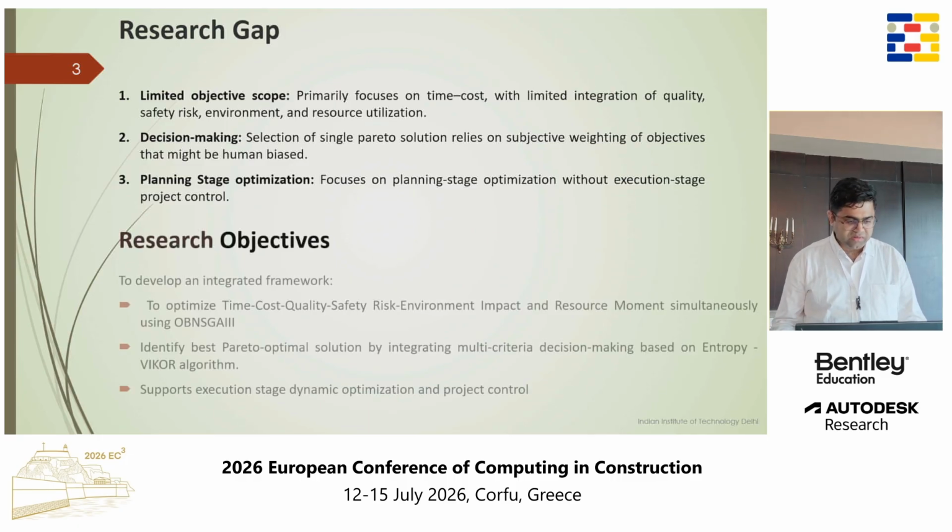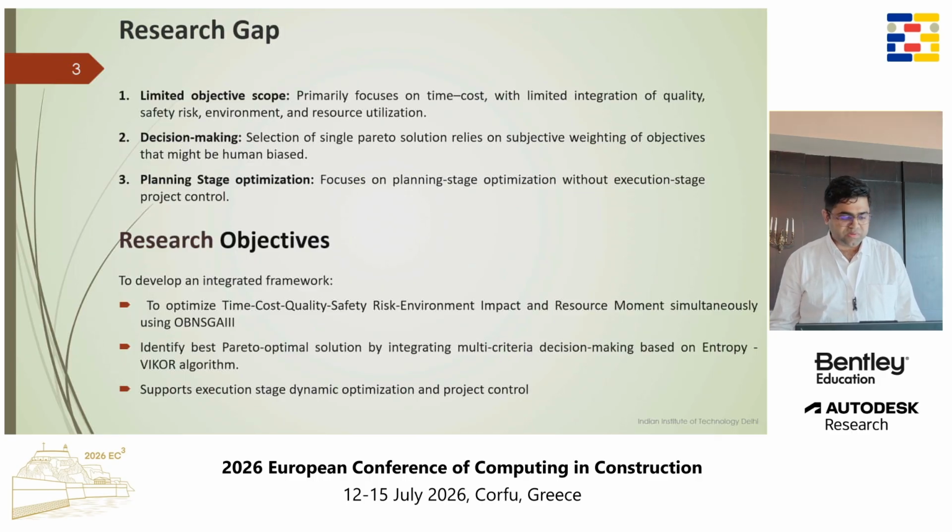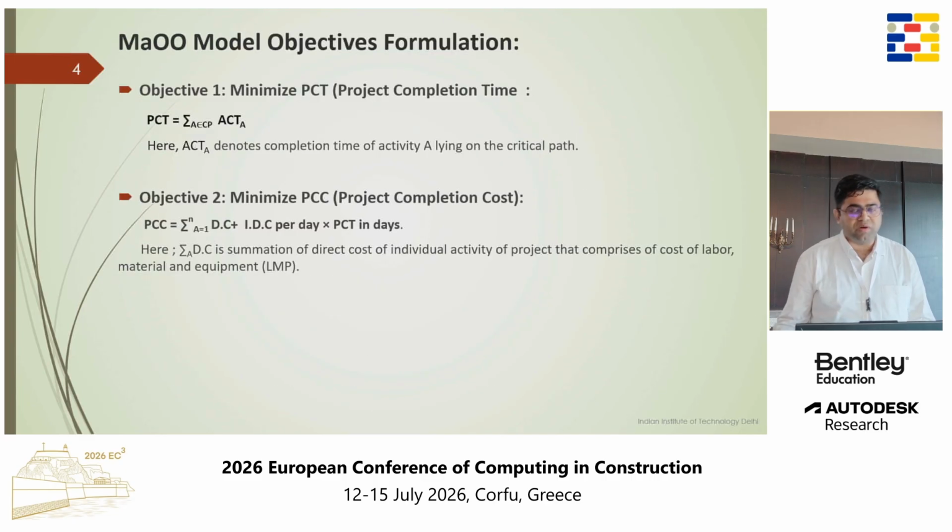So these are the research objectives with which this study was carried out: to optimize time, quality, cost, safety, and resource movement using genetic algorithms to find the best Pareto optimal solution using MCDM techniques. The technique that we used is Entropy-VIKOR, and to understand how dynamic optimization can work out, I will discuss the formulation of our multi-objective optimization.